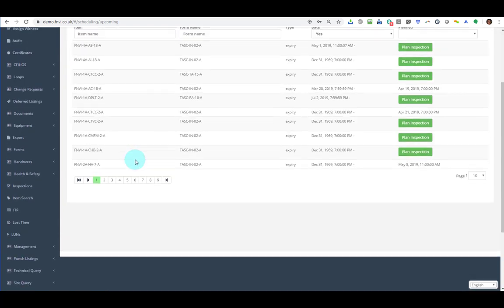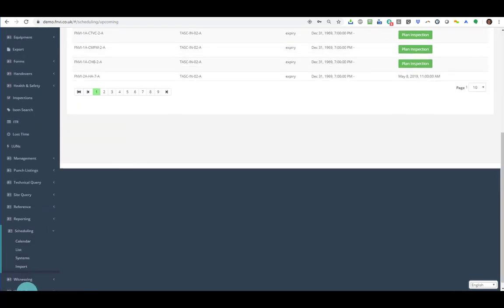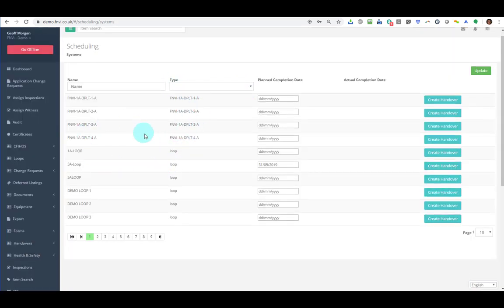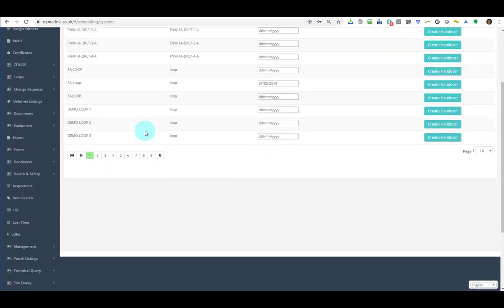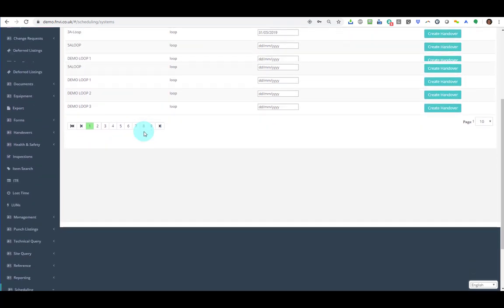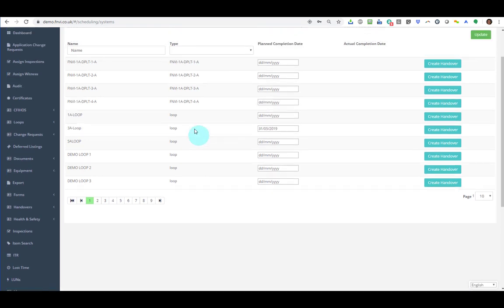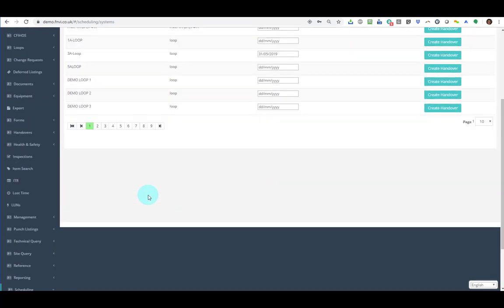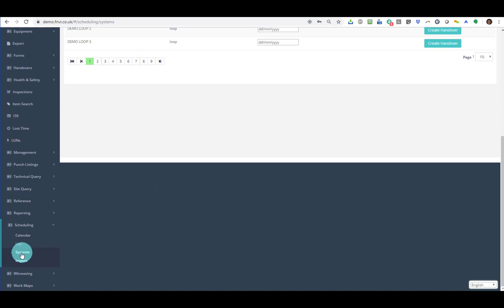In this inspection schedule planning tool, we can see what events are coming up and what subsystems have got dates against them that need to be completed by a certain date or milestone priority criteria. And of course, it's important to note that we can put dates not only against system and subsystem but right down to bespoke single line items and inspections in terms of tags and equipment.